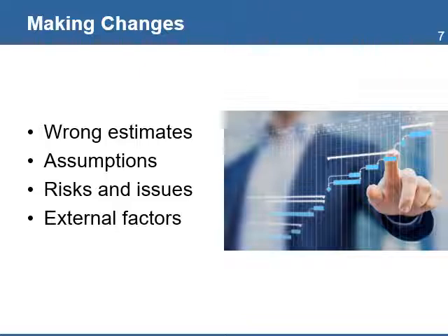Making changes and modifications to the schedule means that the original planned activities now have new start and new end dates. Changes can also imply new resources assigned and changes in the milestones of the project, as well as changes in the completion date of the project.